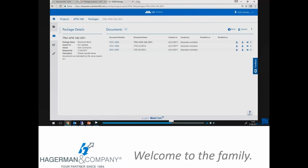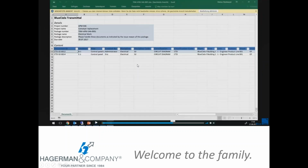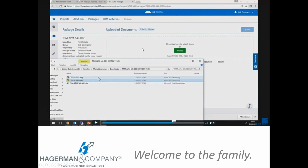Then the hierarchy within the Meridian portal is, you've got the portal site for your company. On that site, you can be managing multiple different projects. And then within those projects, you can have different packages, where a package is like a collection of documents. Because of the size of projects you're typically dealing with, you don't necessarily want to be browsing through thousands of documents. So most incoming or outgoing files are in conjunction with a transmittal of a group of documents, and that's what packages relate to. So we can see, here's a particular package, its name, why was it issued, who's the owner, description, and then here are all the individual documents within that package. And then as packages are created and sent, transmittal records are automatically created and included in the package.